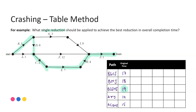If I was to reduce B by the total amount it has, that would be 5. C — the most I could reduce it by is 2. E — the most would be 7. H — the most would be 4. And J — the most would be 1. Where I have no other conditions or restrictions, I simply want to reduce by as much as possible — that's why I'm going by the actual duration of the activities.